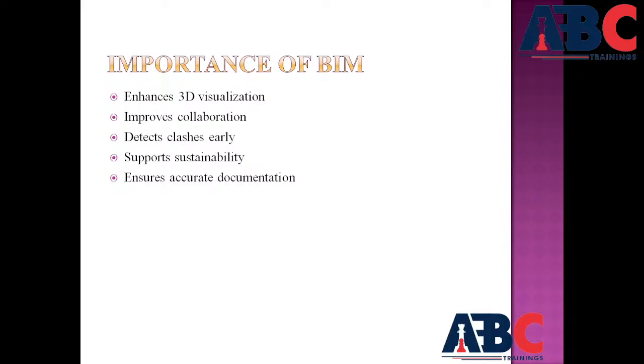Clash detection and error reduction. One of the biggest advantages of BIM is clash detection. By integrating models from different disciplines, BIM identifies conflicts, like ducts overlapping the beams, before the construction, saving significant time on a project.